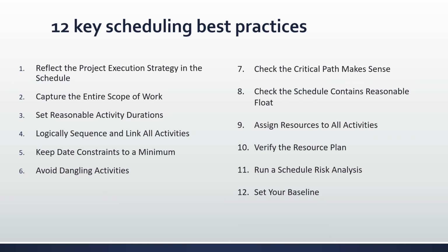Since the baseline acts as a contract with the project team and determines when work will take place, extra care should be taken in getting it right. So aim to set the baseline in stone and don't change it unless authorized to do so. To do this, you need to ensure that changes to the scope of work are captured through a change control process, and the impact of any change to the baseline is assessed in terms of resources required, cost, and time.